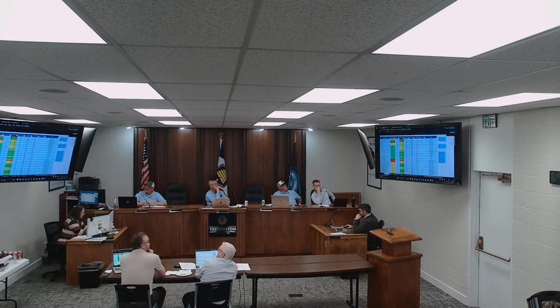So that normally is a 3 to 5 year process, depending on the complexity and on how we choose to manage the project as a whole. Even if you said, okay, we're going to work on the new fire station, for example, the fastest, if we started tomorrow, we could probably get something executed and done is 2028.